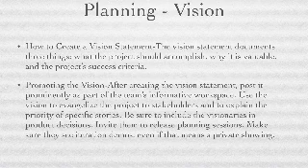And how do we promote the vision once the vision statement is laid out? After creating the vision statement, post it prominently as part of the team's informative workspaces. Use the vision to evangelize the project to stakeholders and to explain the priority of some specific stories. Be sure to include the visionaries in the product decisions and invite them into the release planning sessions. Make sure they see iteration demos, even if that means a private showing of your iteration demos.